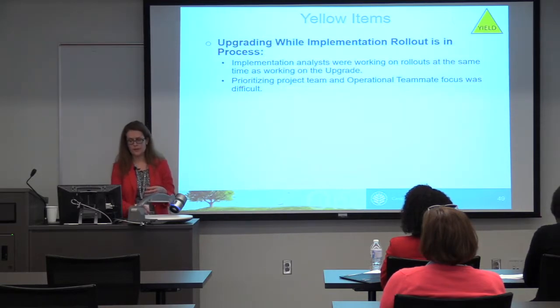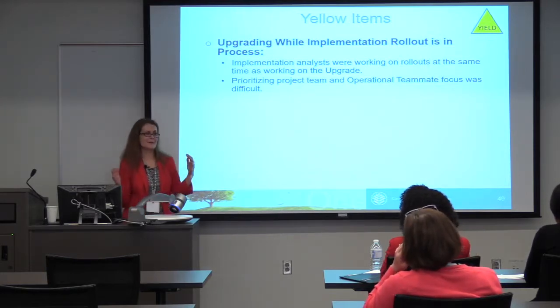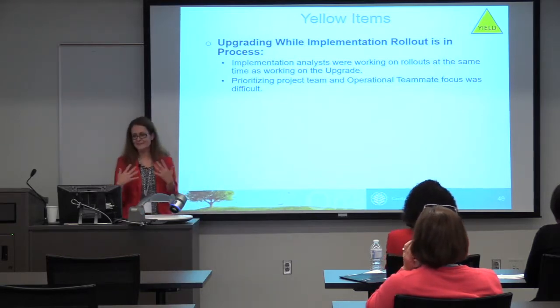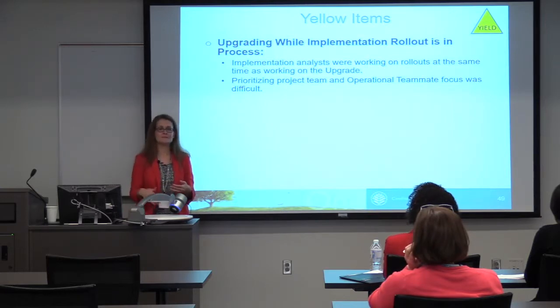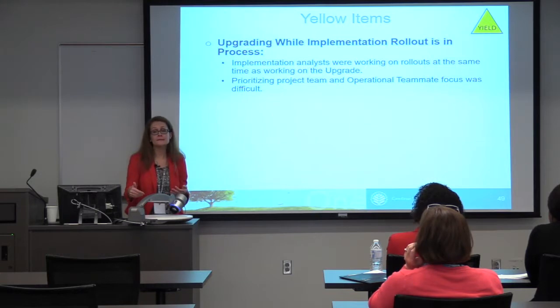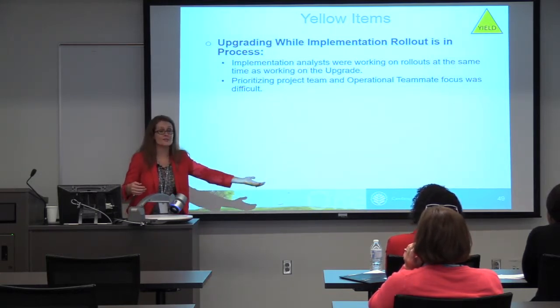All right, so let's pump the brakes on upgrading while you're implementing. I kind of hinted at this throughout. It was so difficult. I felt so bad because here we were following up with these analysts saying, you haven't completed these tasks, you have to have them completed by the end of the week. And they're like, I'm working on this prod issue that we're having.